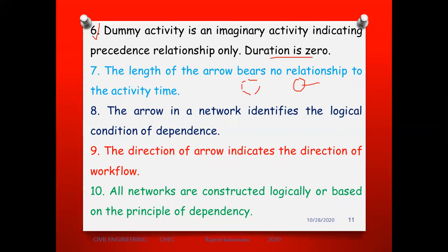So we don't know when this dummy activity comes in the main project. Here, for this dummy activity, there is no time calculation. The duration is 0. Okay, it is only the imaginary activity indicating the precedence.